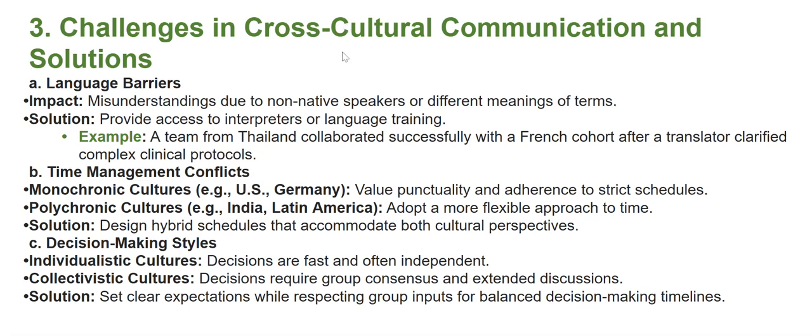Challenges in cross cultural communication and solutions or resolutions for those challenges. Language barriers, impact: misunderstandings due to non native speakers or different meanings of terms. Solution or resolution for that: provide access to interpreters or language training. For example, a team from Thailand collaborated successfully with a French cohort after a translator clarified complex clinical protocols.